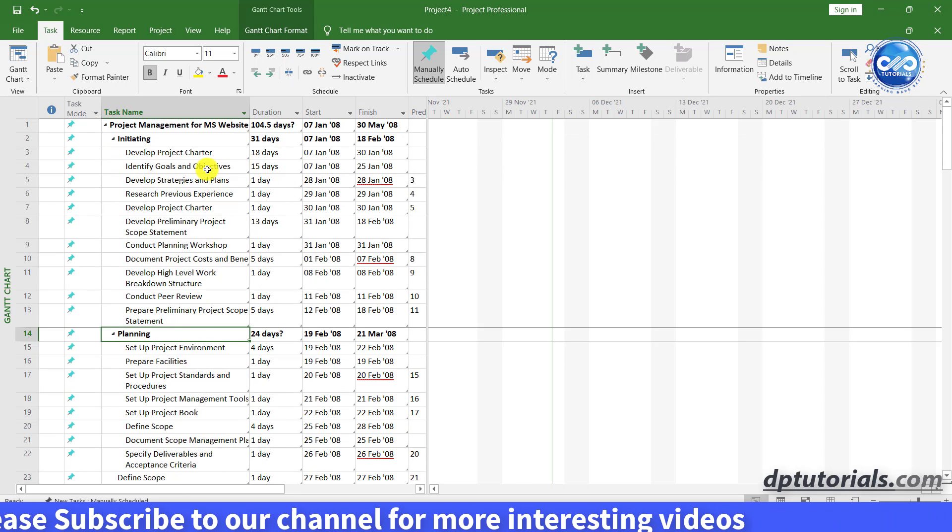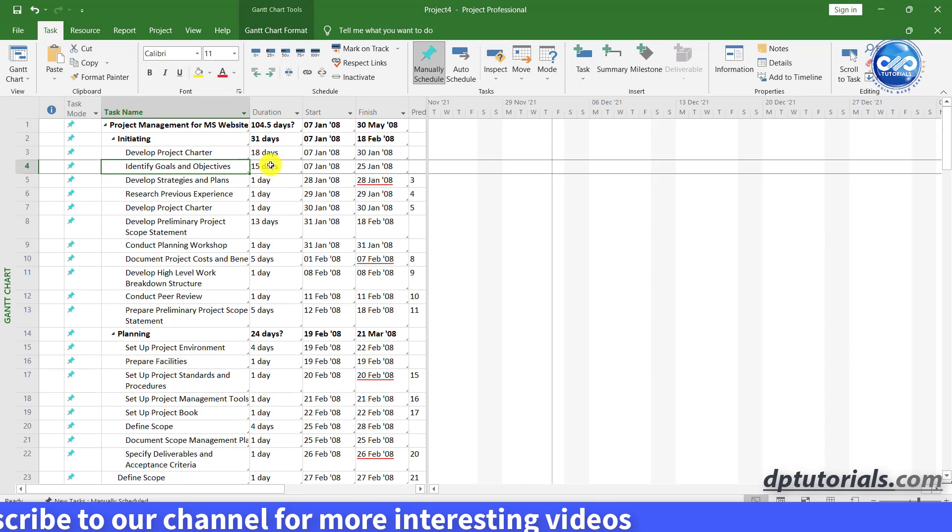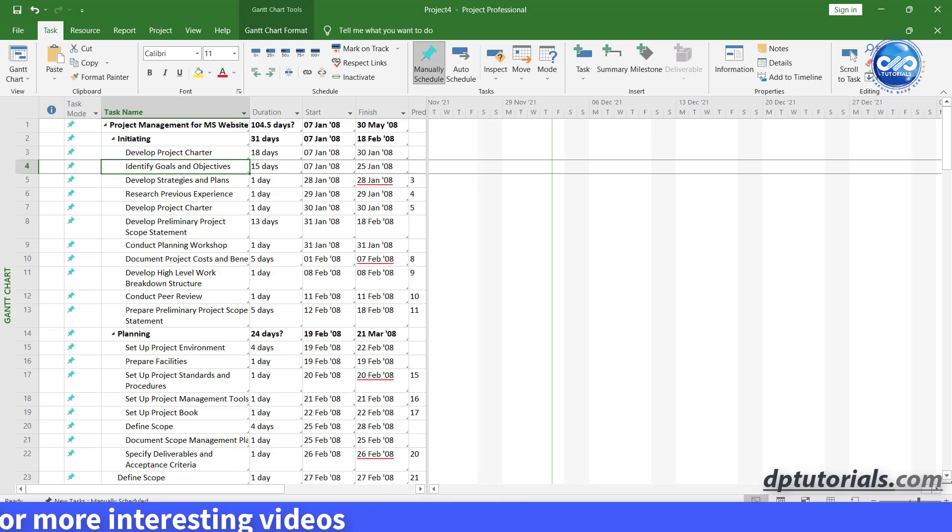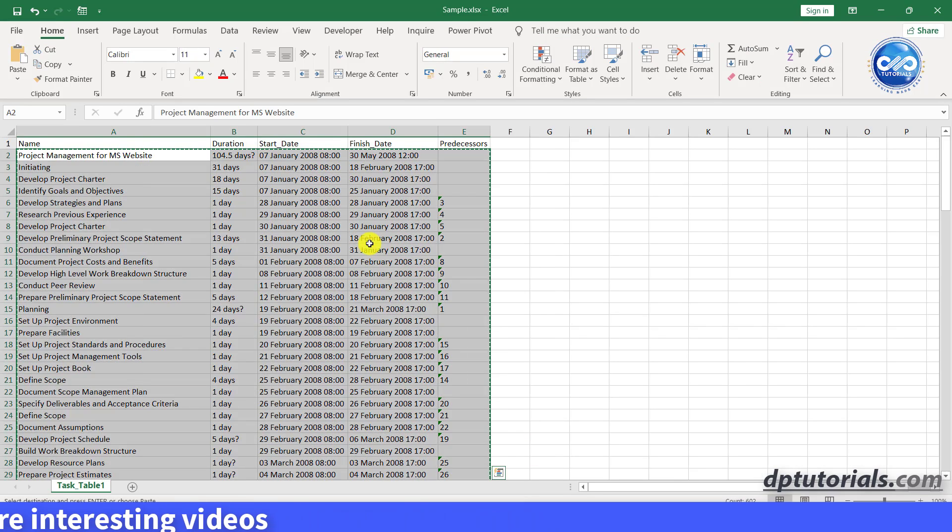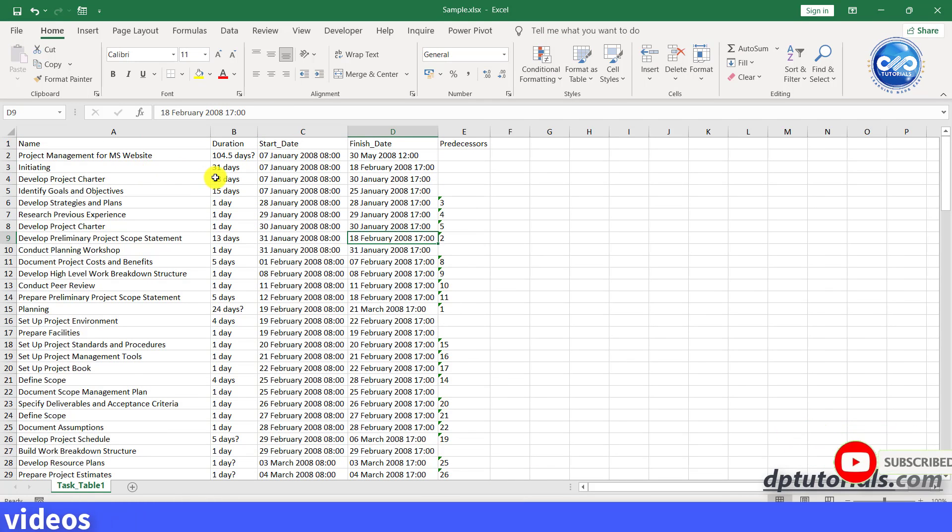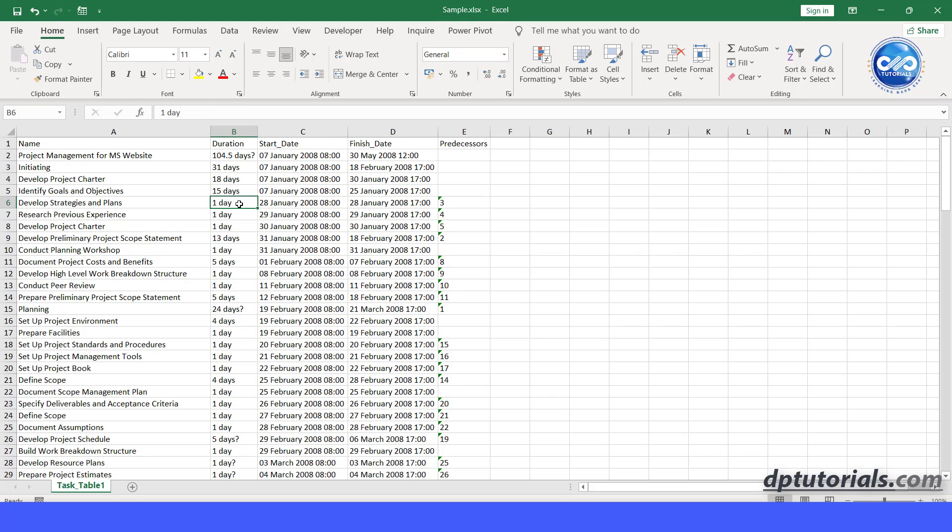If you double click anywhere, you will observe that it is uneditable and lands you into the excel sheet. Now make any change in the fields here in excel. Say change the duration of second activity from 1 to 10 days.